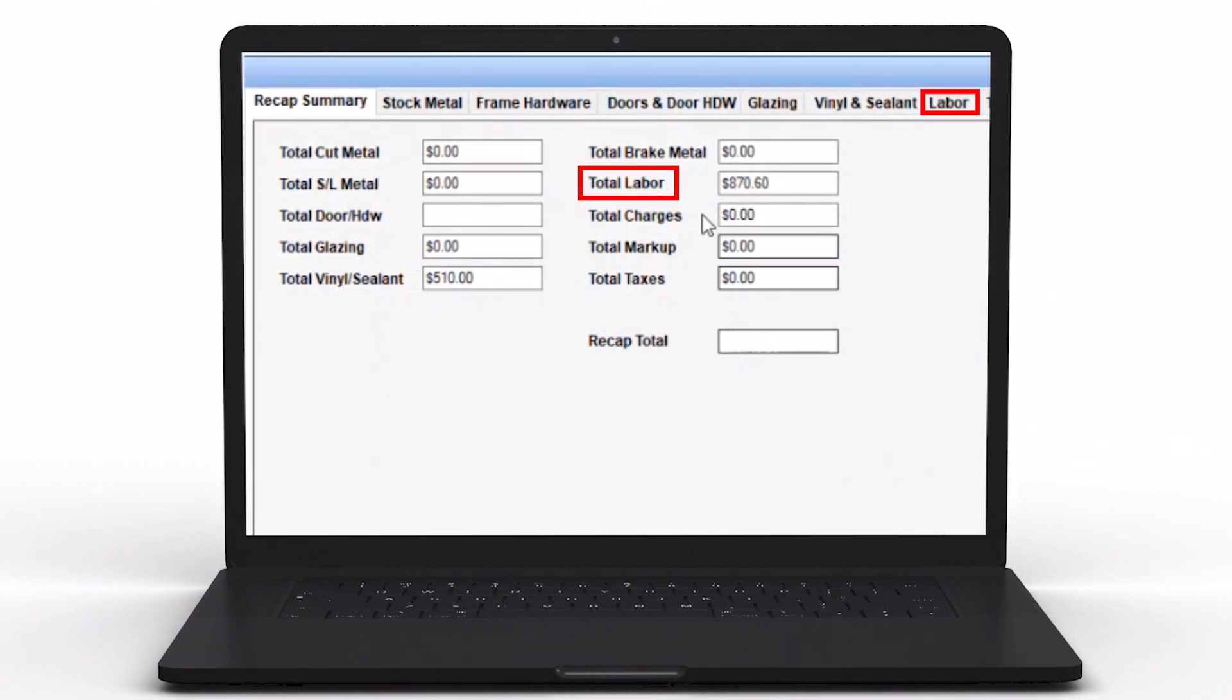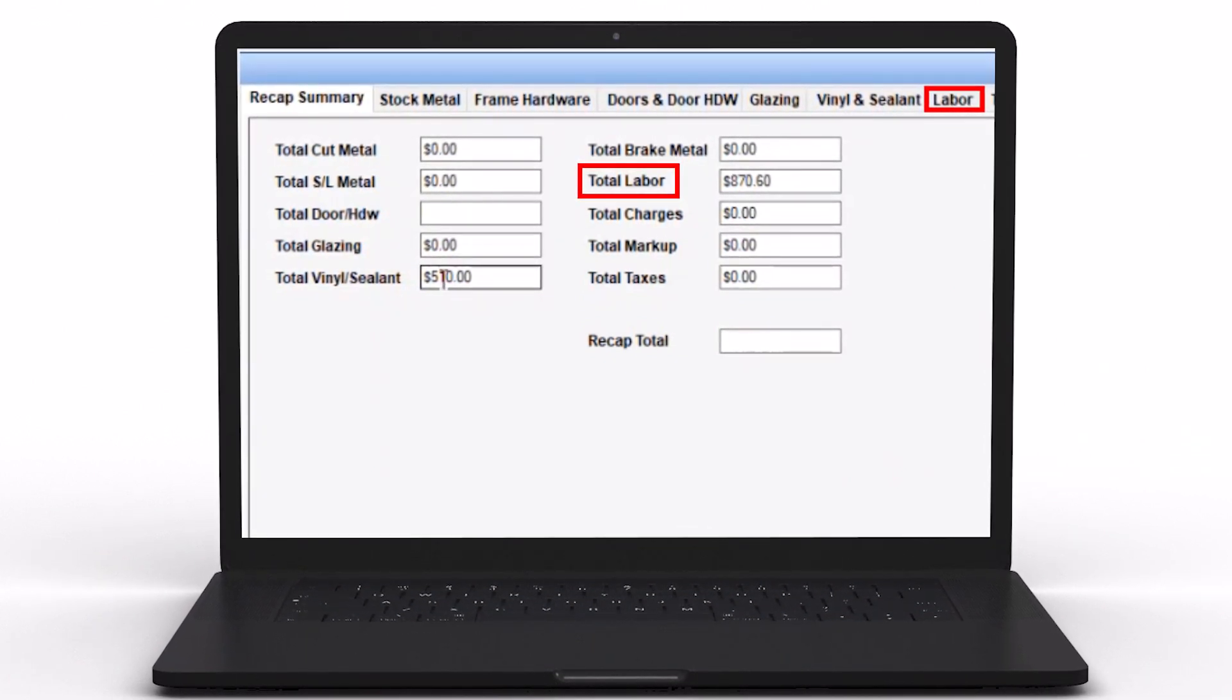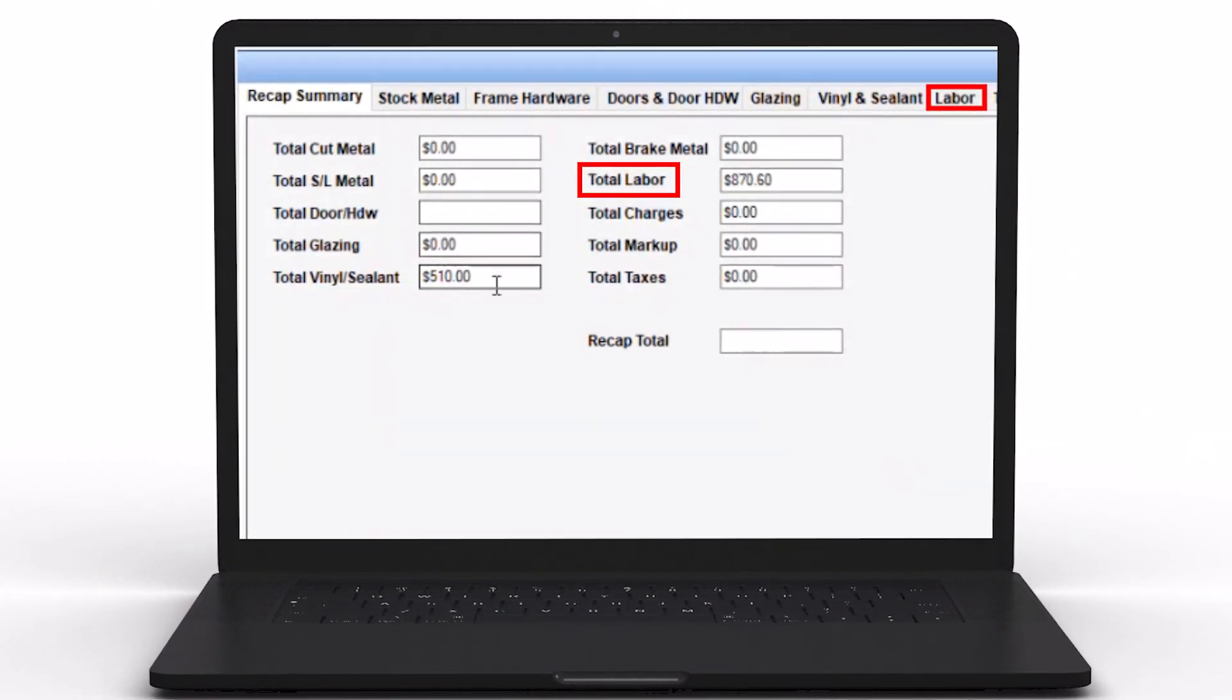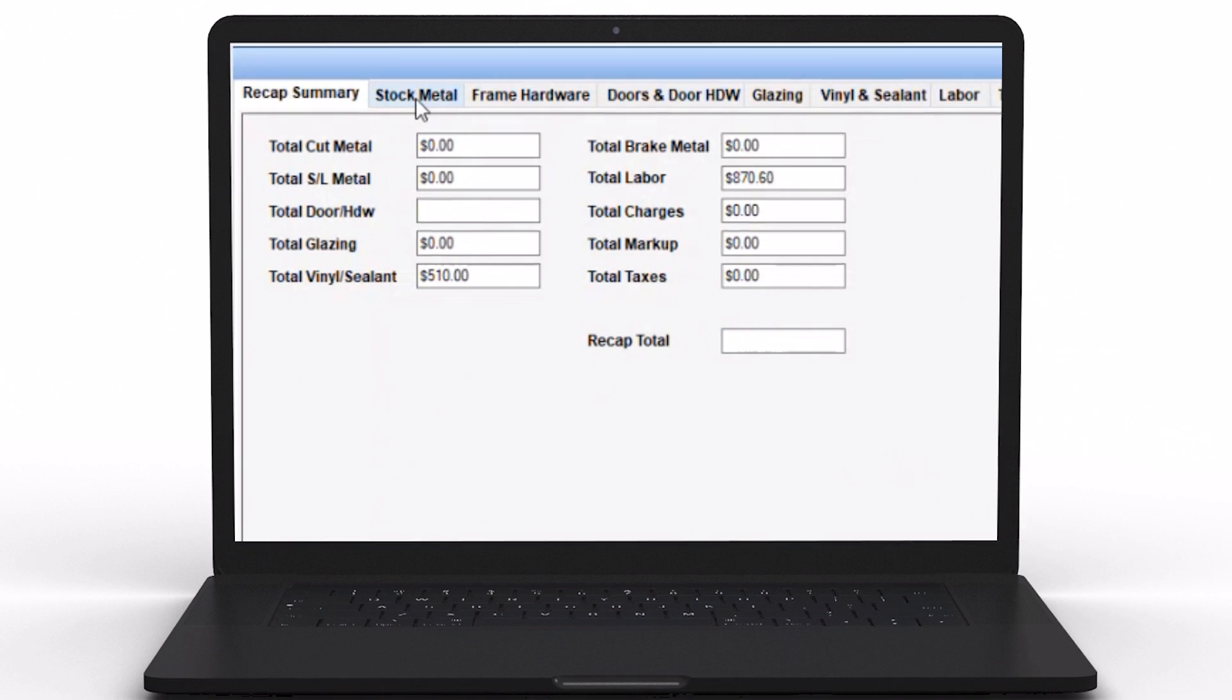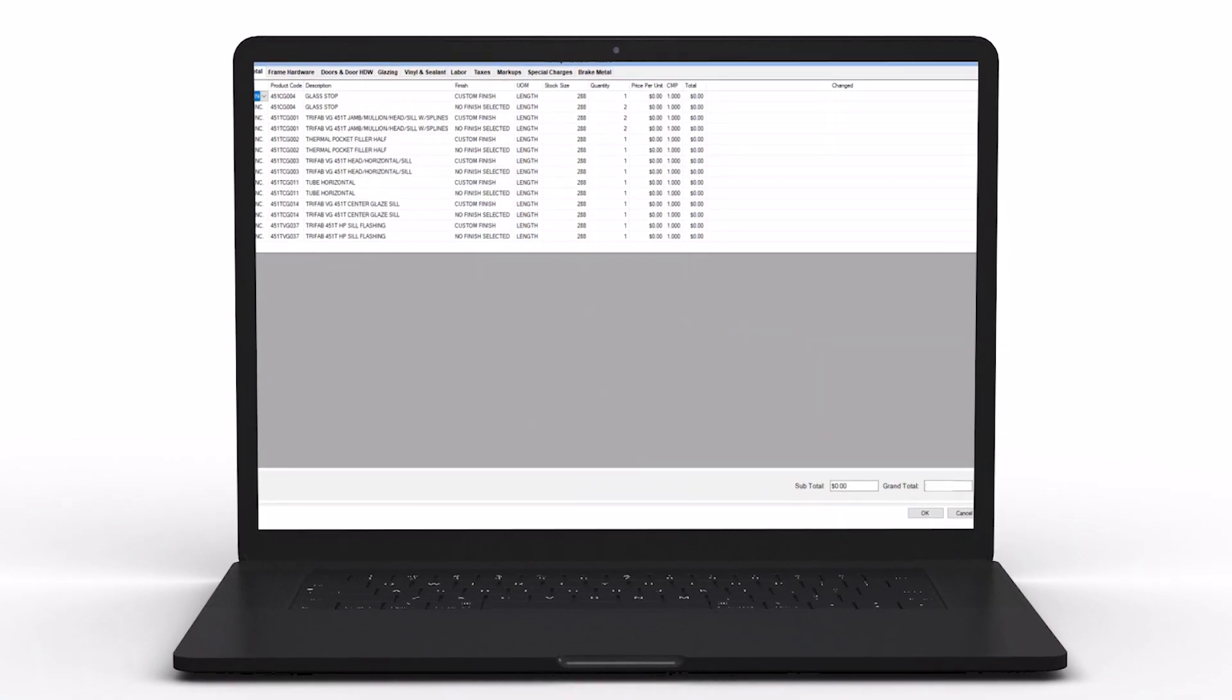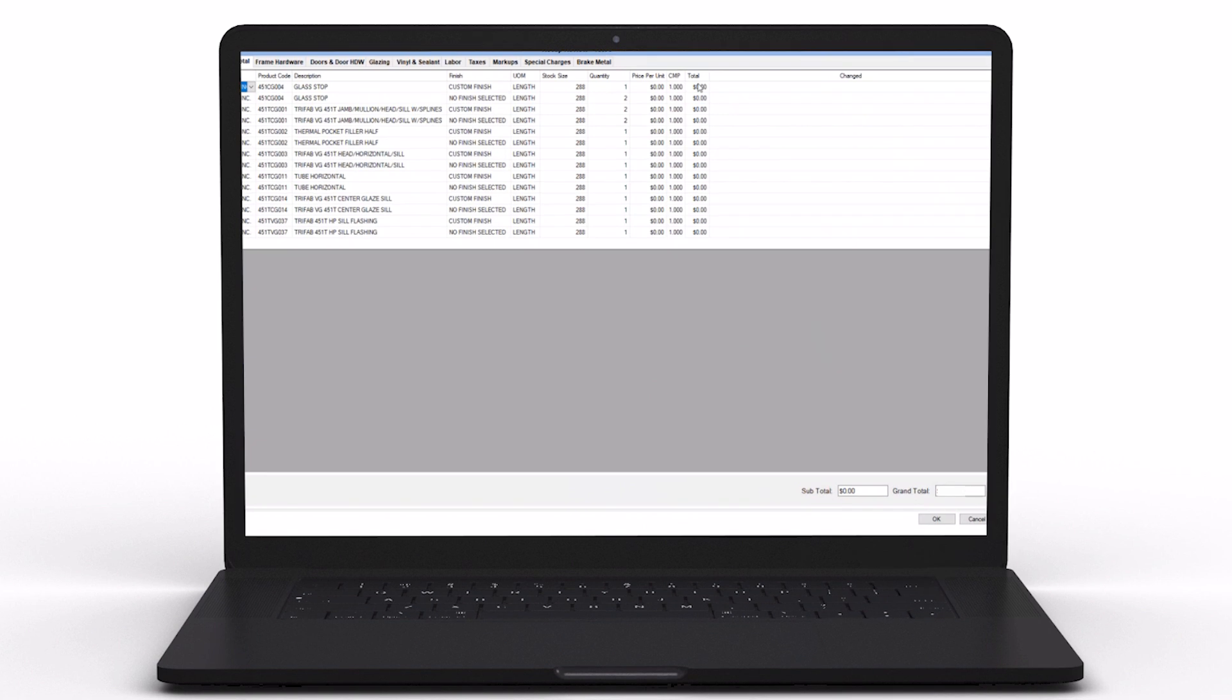It's one of the other tools of this program—not only calculating your material and glass and doing the analysis of the aluminum extrusions, but you're able to incorporate the number of individuals that you may need for a project while also incorporating their labor rates. It's going to give you a full proposal with metal costs, glass costs, accessories, sealants, all of those things, plus labor.